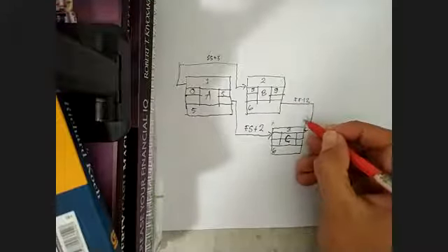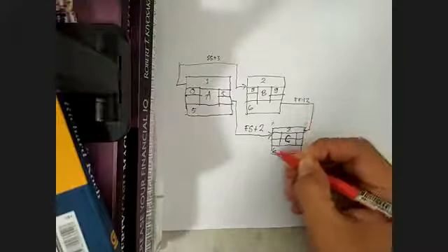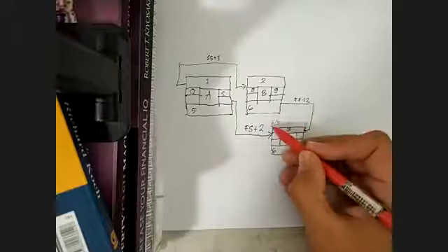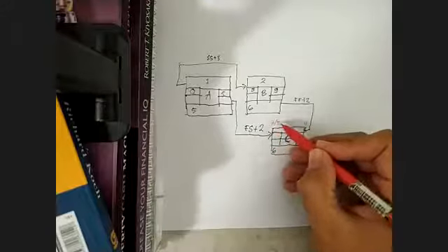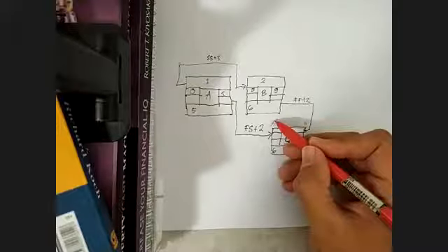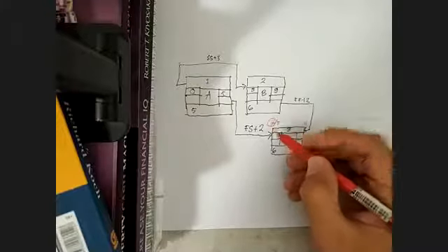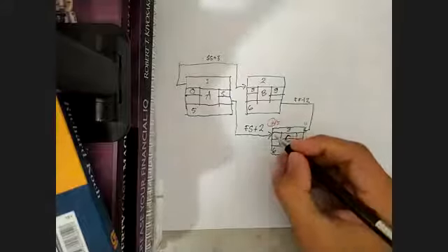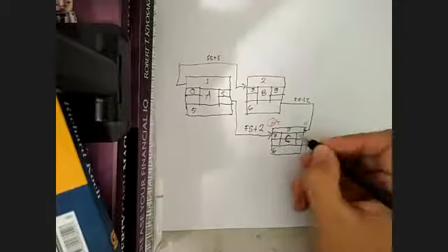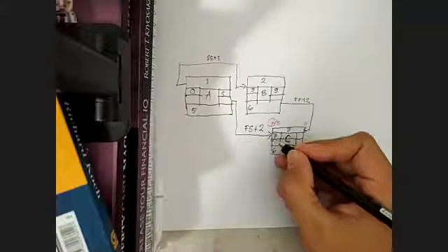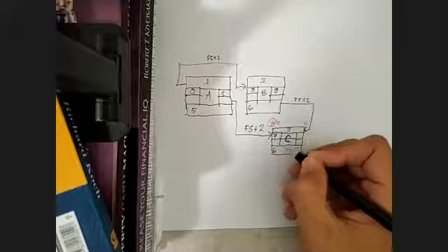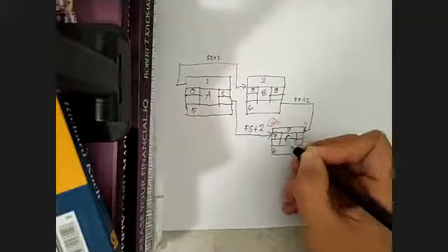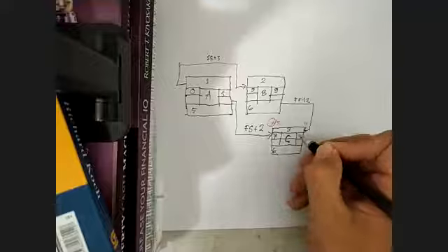Okay. 11 over here, decreasing with 6, we get 5. Okay, based on these two numbers, we will choose the highest number. So I will put 7 in the column over here. Okay, since we already determined the number 7, we can directly fill the blank over here as the early finish. 7 plus 6, we get 13.